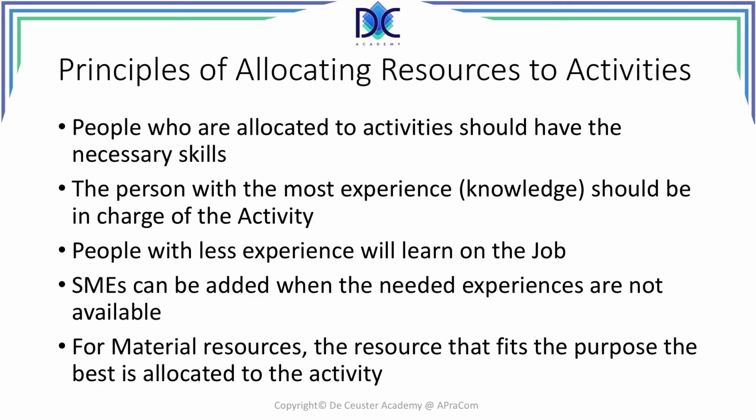Let's have a look at the principles of allocating resources to activities. All people who are allocated to a specific activity or activities should have the necessary skills to do the work. In principle, the person with the most experience, I refer here to knowledge and not age or years of working in the company, should be in charge of that activity. People with less experience will learn on the job.